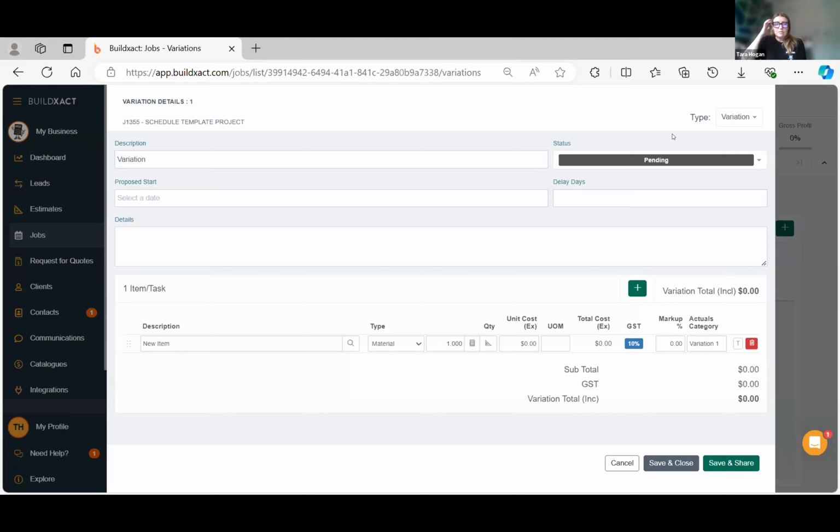And $1,000 is generally because with a structural item, you have to stop work because it can be something where someone goes, oh, I need this extra beam added in, but it means that I got to push site out. Sometimes a whole week, 2 weeks just to get this put in. So you just kind of have to assess how that looks. But I think you should be entitled to charge for that. I know we get markup on our variations, but some of these variations take weeks to make. And if the client goes, no, it's too expensive, all right, sweet, I'm still charging you the variation admin, but I'm just not charging you the variation.